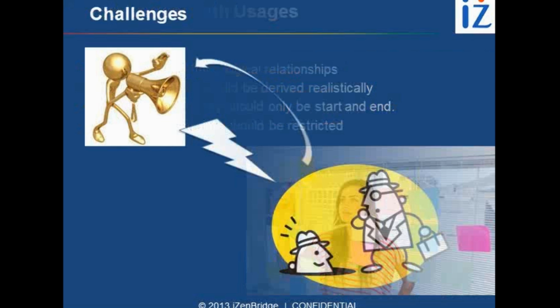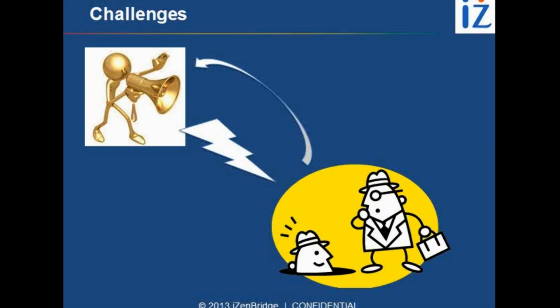So I end up going to the project manager and ask, what should I do? Because as per your plan, this activity should have finished by now, but I think it is not going to finish. So it increases the interaction among team members, and project managers end up taking ad hoc decisions, because when somebody tells him that this activity is not finishing at 11 o'clock, it will finish tomorrow, at that point of time he doesn't have the resources or time available to visualize the critical path again, because it is changing every other hour. So in such an environment, use of critical path becomes challenging.